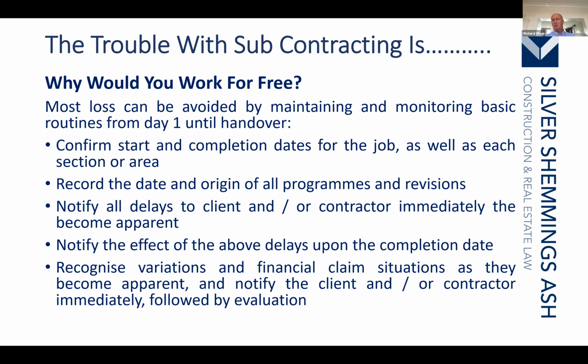So make sure you issue applications on the right dates with full and proper particulars, not loads of amounts on account. Back up your amounts. Make sure you've got proper instructions. Take photographs of the works you've undertaken. Make sure your day work sheets are issued on time and are fully particularised.